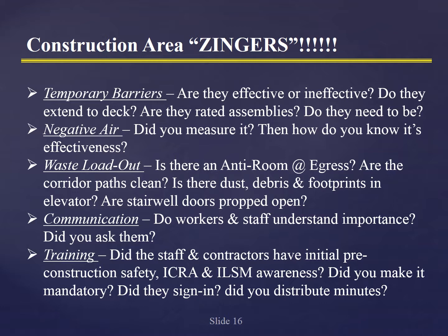Again, and then right along that is training. There needs to be something that documents training for the contractors before they need to have awareness. There are several training products out there right now that people can take. Obviously related to this program is a product called CHT, Certified Healthcare Technician, an online program. Take the 3 hours of program online at their own convenience. Get a certificate at the end. Renew it every 3 years to stay current. Again, that's something that you could put into play that could help establish a baseline that the people that came on site have at least awareness.